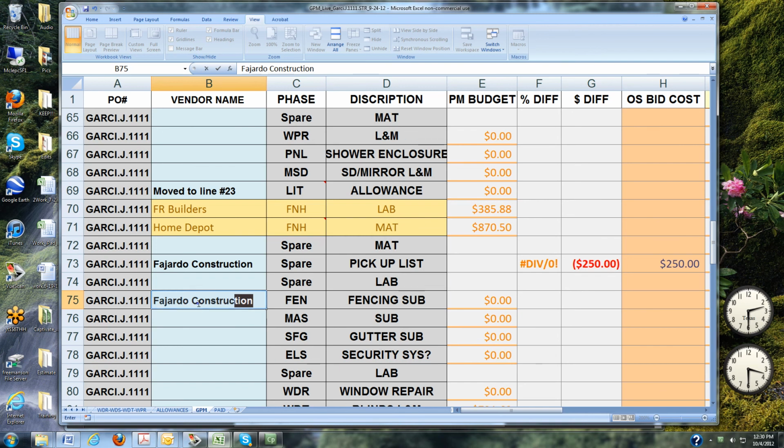So the estimating department would add him in here as the fencing sub. The estimating department would put in the dollar amount. So say the budgeting amount is $300 for the fencing, and after estimating puts in that $300 for the fencing budget, and these columns are all filled out, then when the super creates this budget or the spec amount, they're going to come in and put in whatever that might be. We'll say it's the $300, and you do it just like any other single line item entry. The difference for extras, supplements, and credits is the estimating department has to fill in these line items right here for the spec to be in the budget.